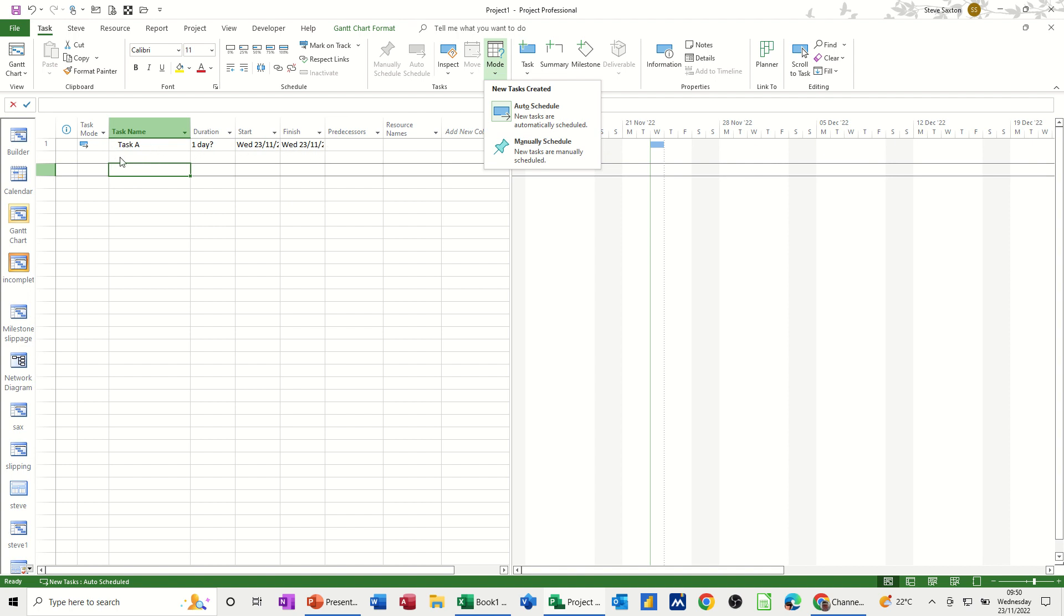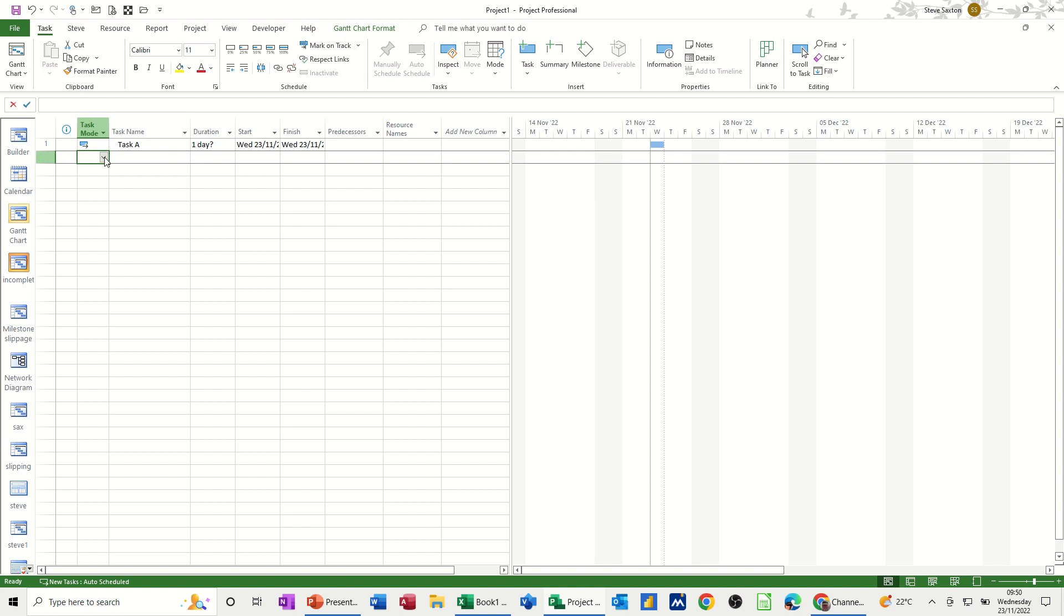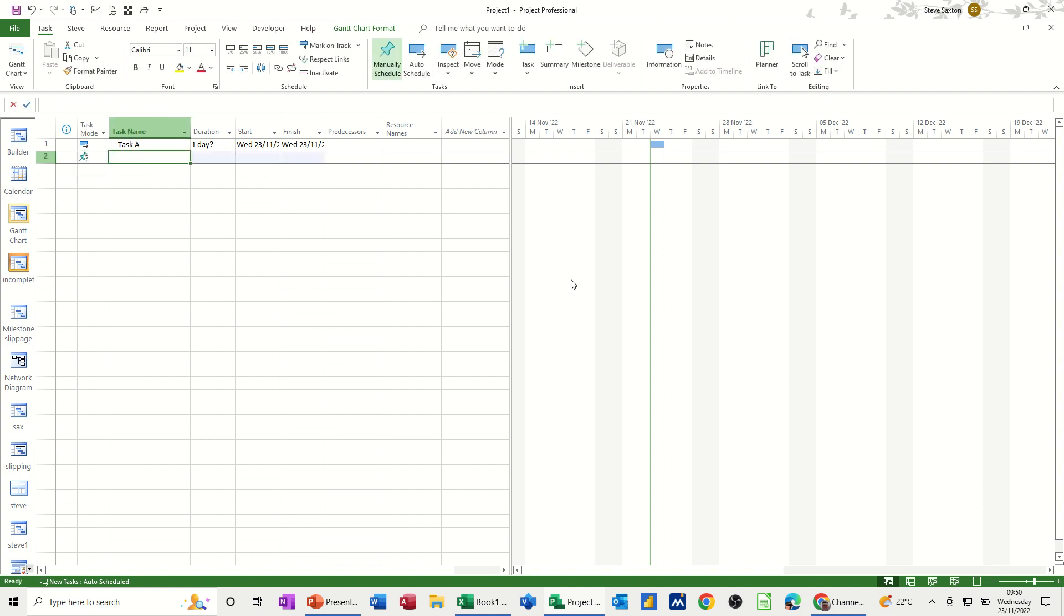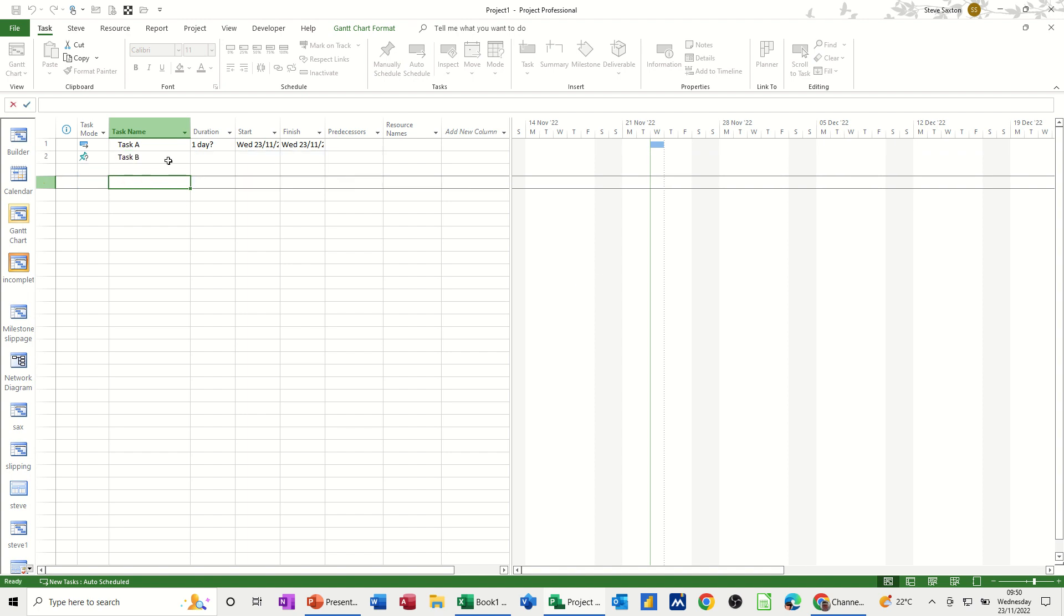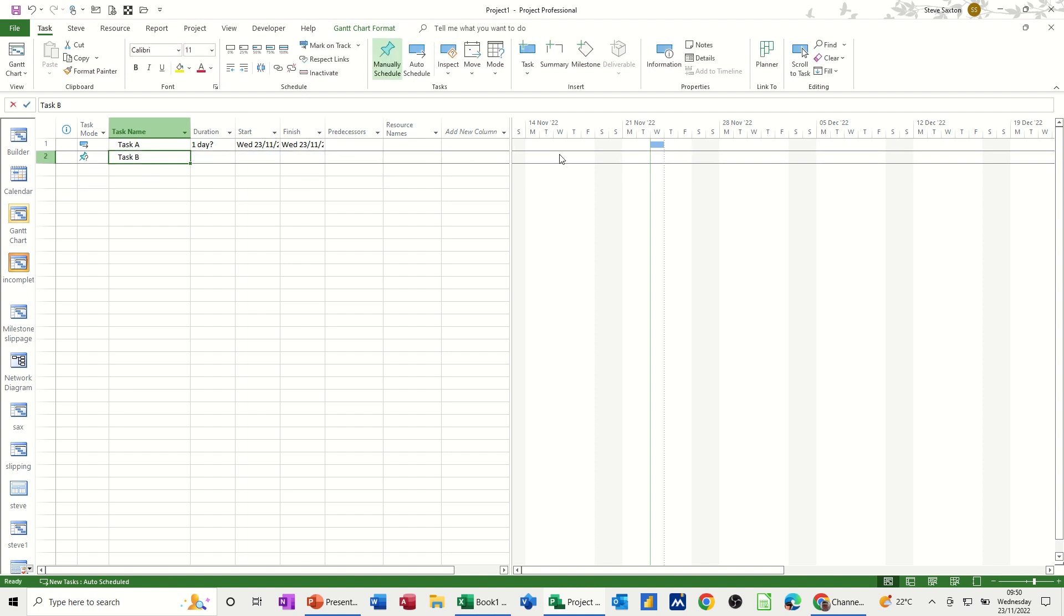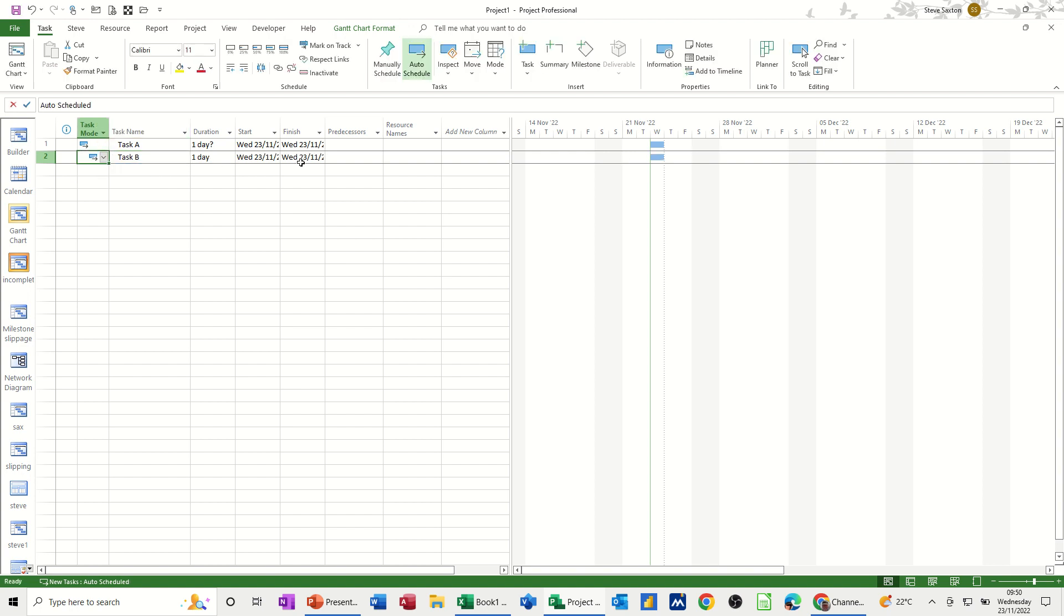If I put a task to manual and do task B, that's all I get. I don't get any of this information and I don't get an indicator on the Gantt chart. So some people like to work in that way, but personally, I don't. I'd rather see the information and put the information in there than use links to schedule this and durations to schedule this, which is what project was designed for. It was designed as a scheduling tool.